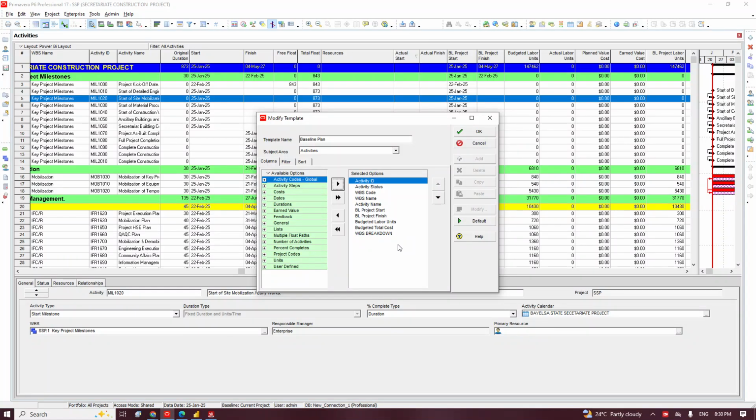So the question here is, what are those items, what are those cells that I need to be updating often? So for here I said those ones that I will be updating often is not a baseline, because baseline we don't update them, right? Unless we have secured a change or an approval to the baseline. So because of that, what I need is this. So I will arrange this.